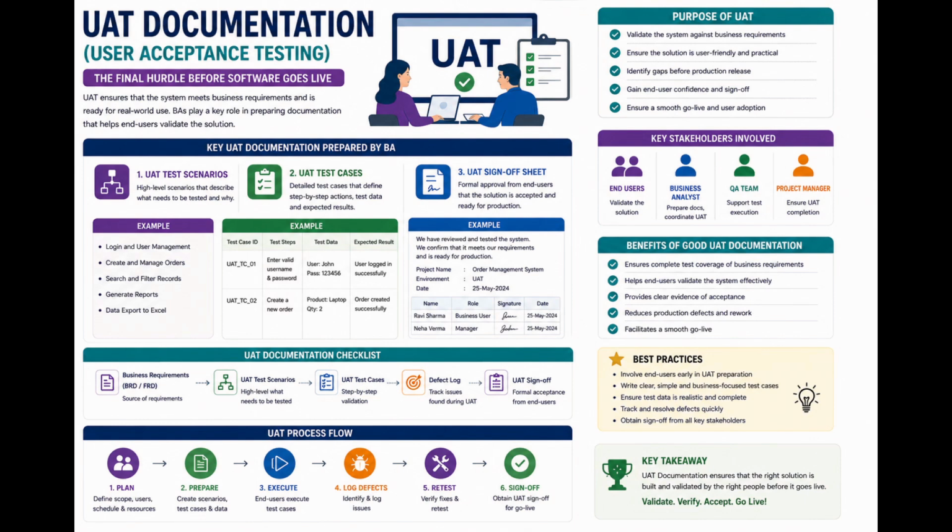UAT documentation, user acceptance testing. The final hurdle before software goes live. This section covers how BAs prepare for UAT, including drafting test scenarios, test cases, and UAT sign-off sheets to ensure the end users validate that the system works exactly as requested.